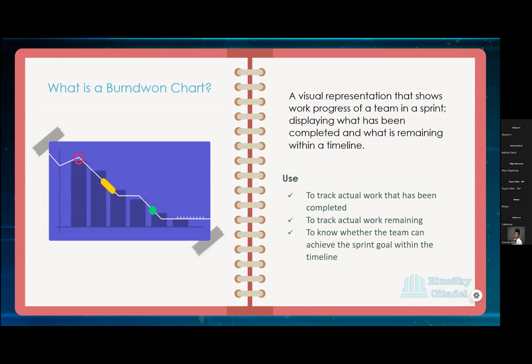And most times, don't even show them at the end of the sprint. Try and be strategic with it. When you're in the mid sprint, you want to have a mid sprint overview to say, okay, what have we taken across the line? Let's have a status overview, kind of. This is our goal. What are we working on? Are we really working on the goals, or have we brought other things into the sprint that we're focusing on, rather than the goals that we're meant to work on? So these are the things you would normally monitor to ensure that your team is staying focused and staying on track of the things that they've committed to.